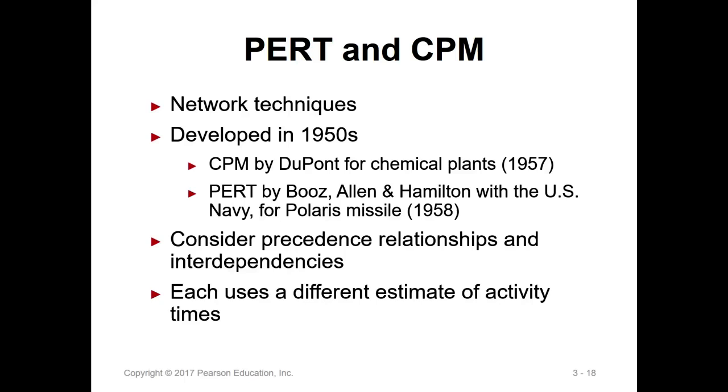But for the PERT method, you have to consider probability. They give you three numbers to estimate an activity. In the best situation, everything works, the shortest time is 1 day. Most likely 3 days. In the worst case, maybe you need 6 days. So they give you 3 numbers in the PERT method. We will see you have to use probability in that part.